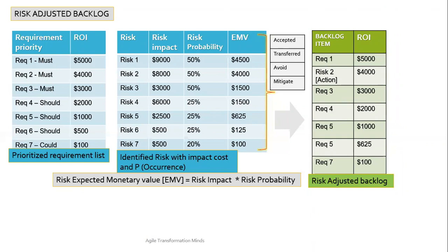Pushparaj is saying there's a situation where, if could have has a higher ROI, then it could be moved to should have or must have. Pushparaj, actually, could have, should have, and must have is for customers. It's not for developers. We are categorizing with the customer and understanding from them which features are must have for customers. So you're saying there can be a possibility that the ROI for a must have feature is low. It can be low also. There is no issue with that. It doesn't always mean that all must have features have higher ROI.